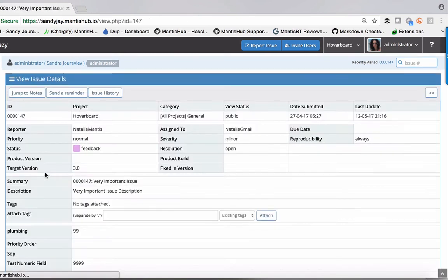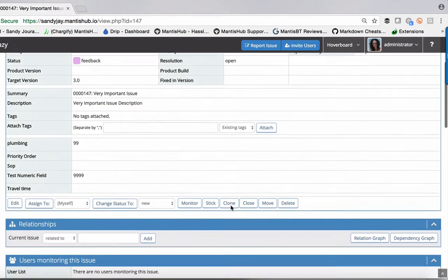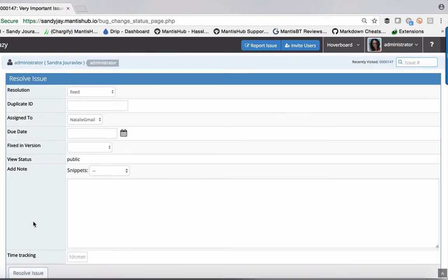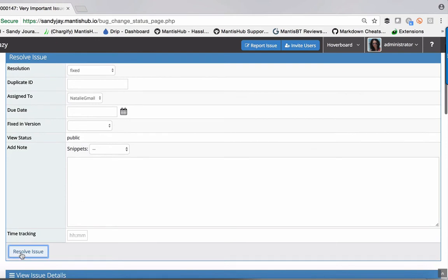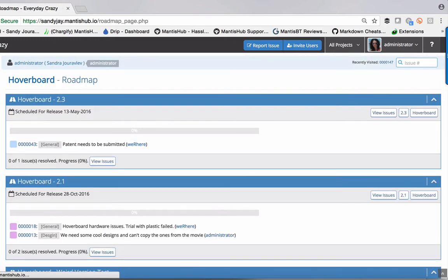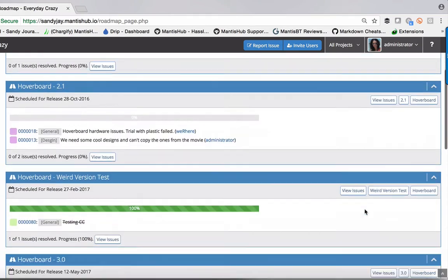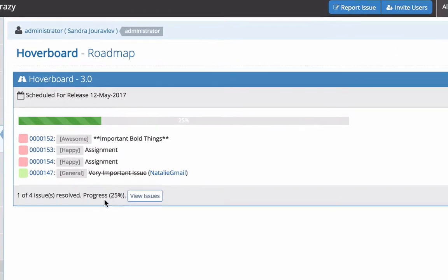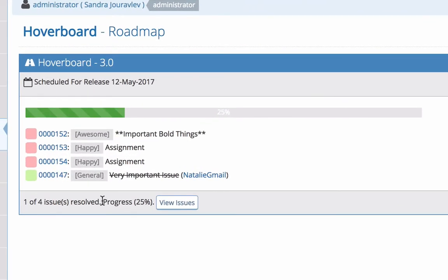If I head into one of these and resolve it because I know it's been fixed, then head back to our roadmap, we can see the progress is now 25% because we've resolved one of those four issues.